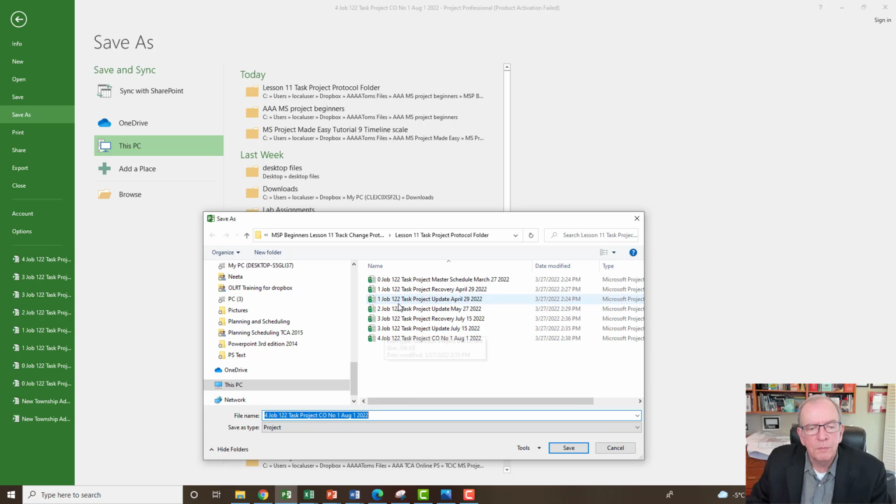The other thing that I would be filling in here, and I'll do this in another video, is a schedule narrative, which is generally a requirement, at least in the construction industry, to give an executive summary of what happened for the project. So I use that in my file naming protocols too. And maybe this is a contemplated change order.